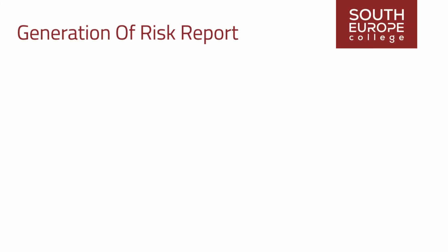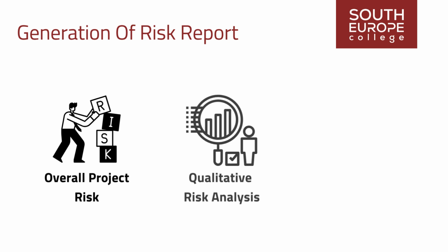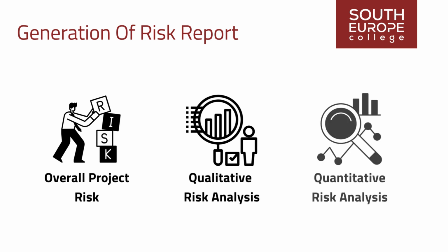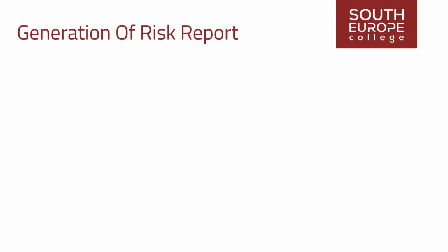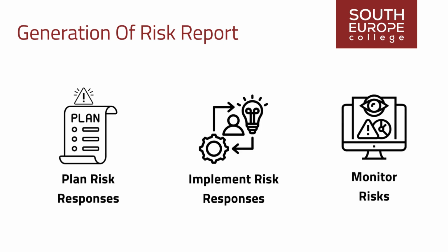The risk report provides an overview of the sources contributing to overall project risk, developed incrementally throughout the project risk management process. It incorporates findings from perform qualitative risk analysis, perform quantitative risk analysis, plan risk responses, implement risk responses, and monitor risks as these processes unfold.